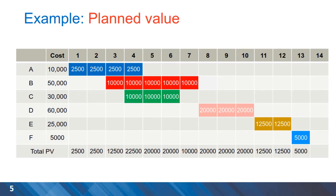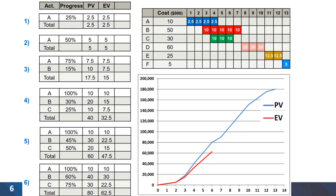Here is an example of a project with six activities, and the total planned values are tabulated at the bottom. We can analyze the earned value at a given stage — for example, at the end of the second period, the expectation is that 50 percent of the budget for activity A has been spent, and the actual progress is also 50 percent. So both planned value and earned value are five.